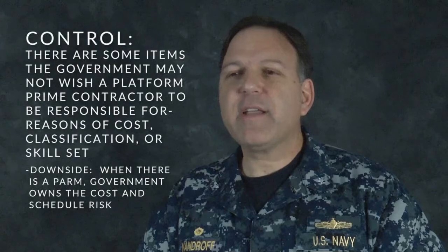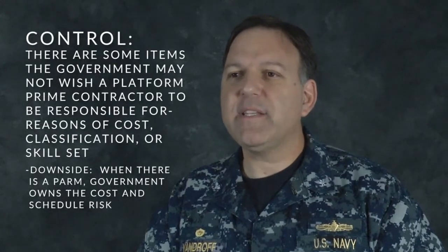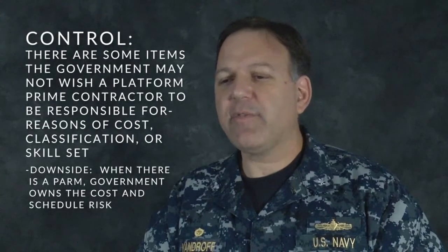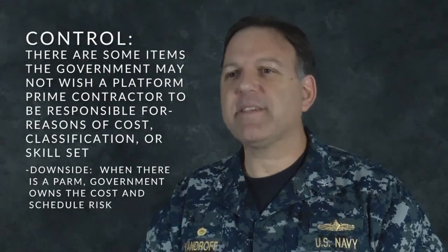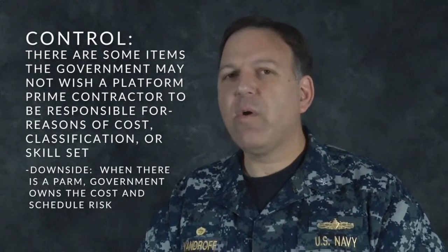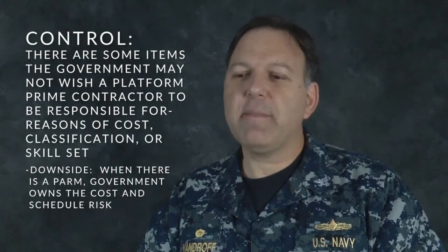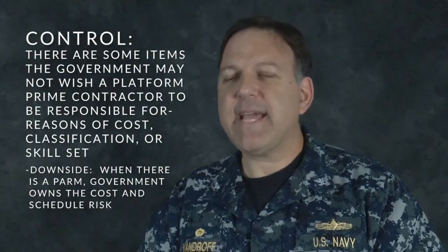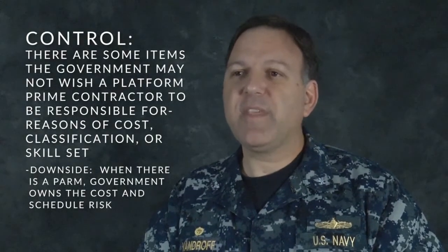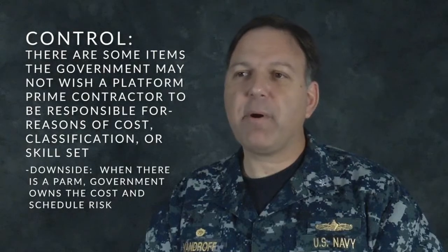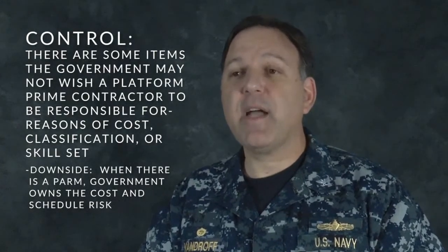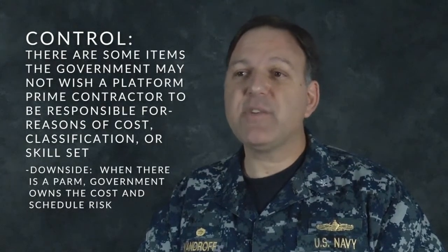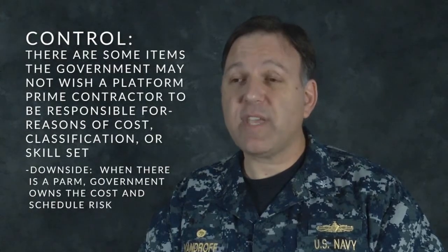And finally, the government might choose to have a PARM because of control. There frankly are some things you don't want your lead industry partner buying, either for reasons of classification or because it doesn't fit within their skill set or because the government might be able to buy them more cost effectively. Now, the downside for all of those is when the government decides to do it itself and have a PARM, the government, not the prime contractor, now owns the schedule and cost risk associated with that effort.